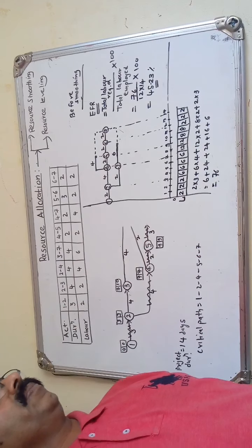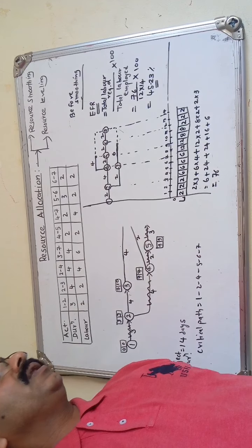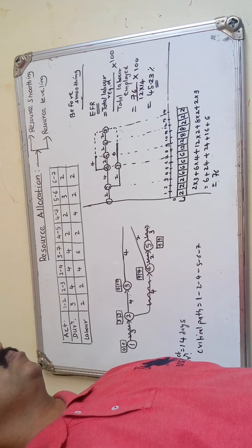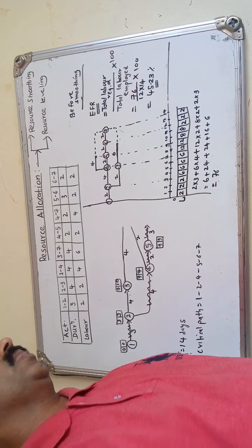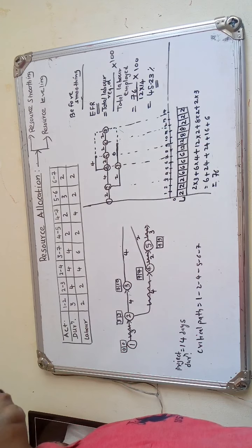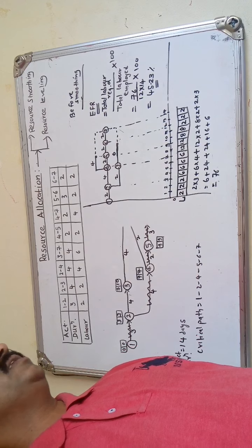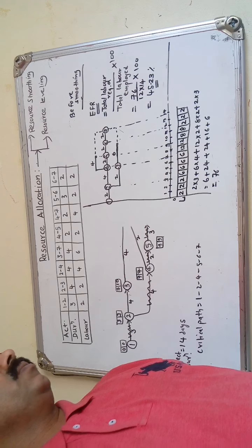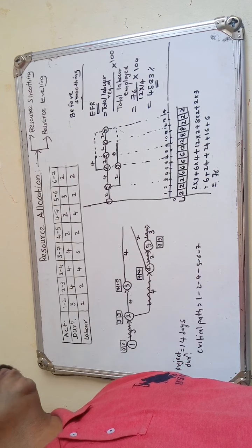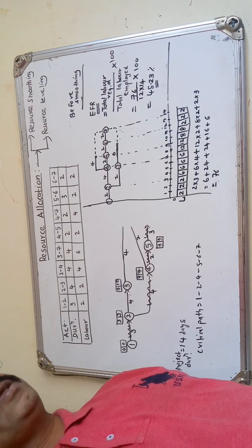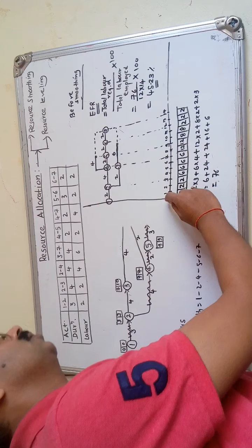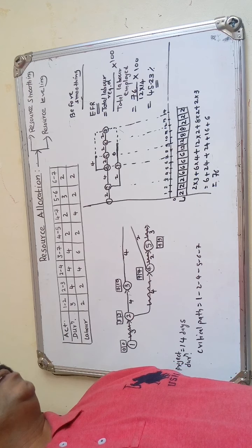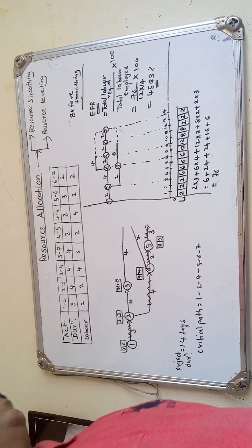Now very less utilization, very poor utilization of labor, is seen here. Less than 50% force ratio we got. So we want to strengthen that utilization. We want to utilize the manpower or labor effectively, and for that purpose we have to use the technique resource smoothing, where the project duration of 14 days will remain unchanged. That is the constant for us, right? So this is the technique.